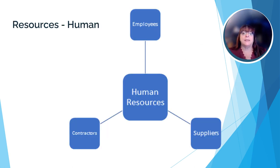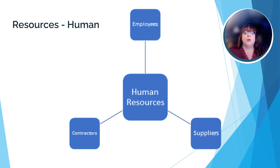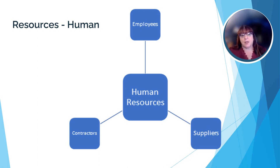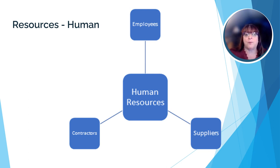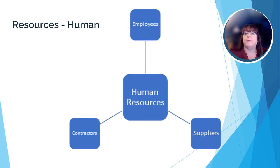Now that we've looked at the scheduling part of the project plan, let's take a look at resources. There are two types of resources a project could use: human and physical. Human resources are the human beings or people that are needed to complete the project — anyone who has the necessary skills to complete the project. They could be employees of the company, contractors the company hires to perform some or all of the tasks, or suppliers who make sure the physical resources are there when the project team needs them.